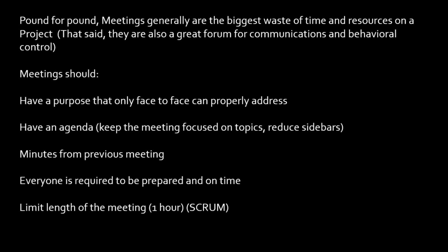Keep a meeting short. Keep it to about an hour or so. I love Scrum because they keep their meetings to 15 minutes. They don't even let you sit down for their meetings. In Scrum, they're stand-up meetings. Okay, it's part of the methodology. You stand. You only ask three questions. I believe I went over Agile with Scrum before, but they're just going to touch on it on the exam. But I'm just telling you that they keep their meetings very short.